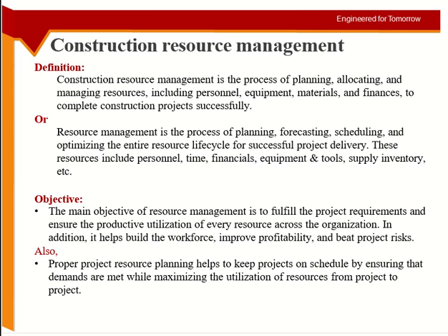And another part of resource management is to reduce the project risks. Okay, so we need things when they are required. So we don't want to delay the project because you did not order the material on time, or somebody has got stuck in traffic, or something is stuck in customs or something. So you have to reduce these risks for your resources. Also in the resource planning, you have to make sure that everything is done on time, while maximizing the utilization of the resources from project to project.